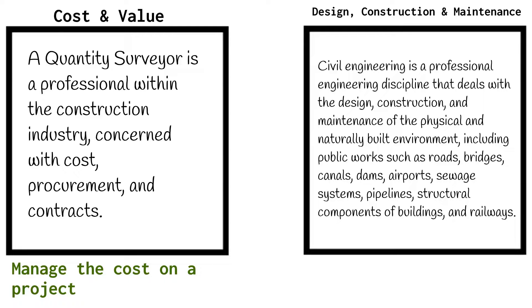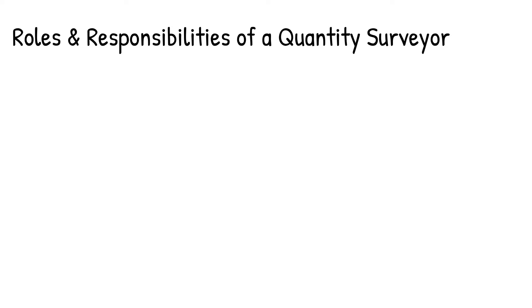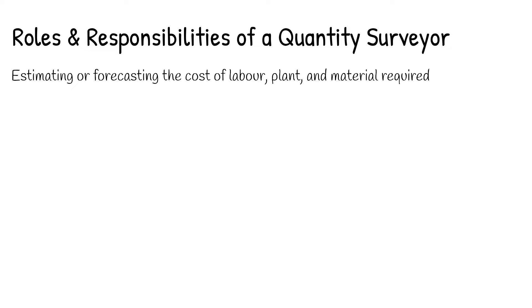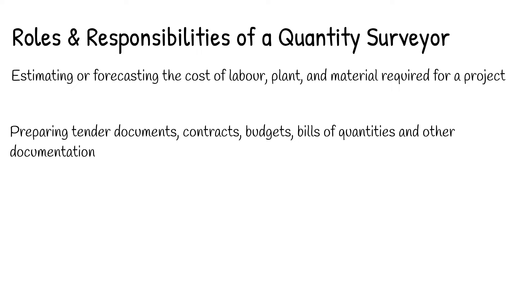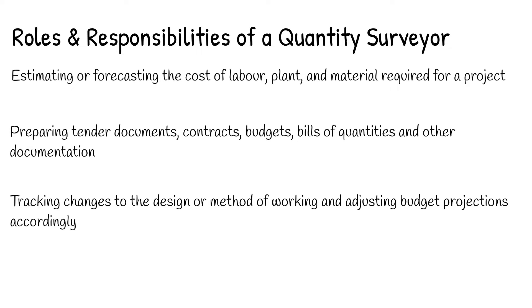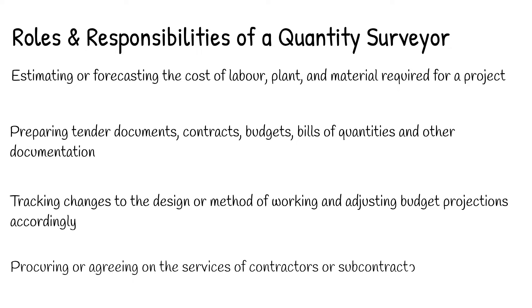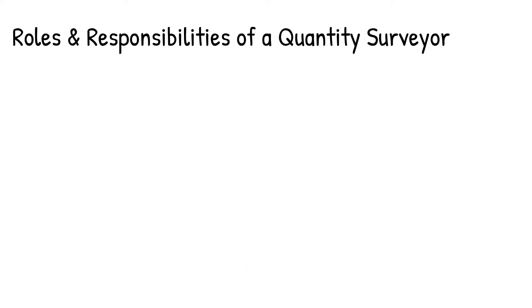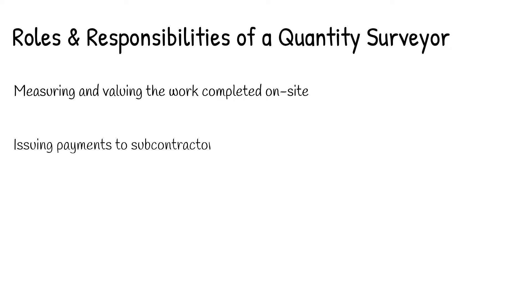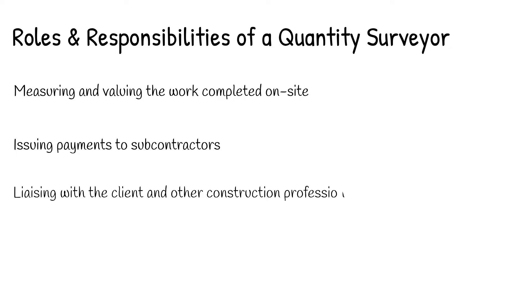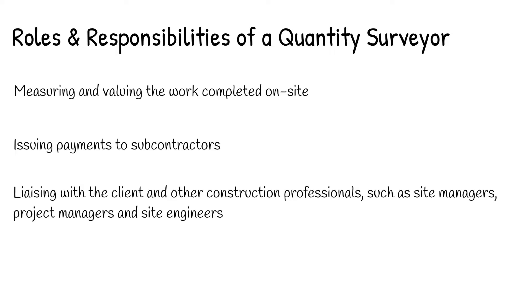You're probably wondering what a day in the life of a QS and civil engineer is like. A normal day for a quantity surveyor may include estimating or forecasting the cost of labour, plant, and material required for a project, preparing tender documents, contracts, budgets, bills of quantities, and other documentation, tracking changes to the design or method of working and adjusting budget projections accordingly, procuring or agreeing on the services of contractors or subcontractors, measuring and valuing the work completed on site, issuing payments to subcontractors, liaising with the client and other construction professionals such as site managers, project managers, and site engineers, and selecting and sourcing construction materials.